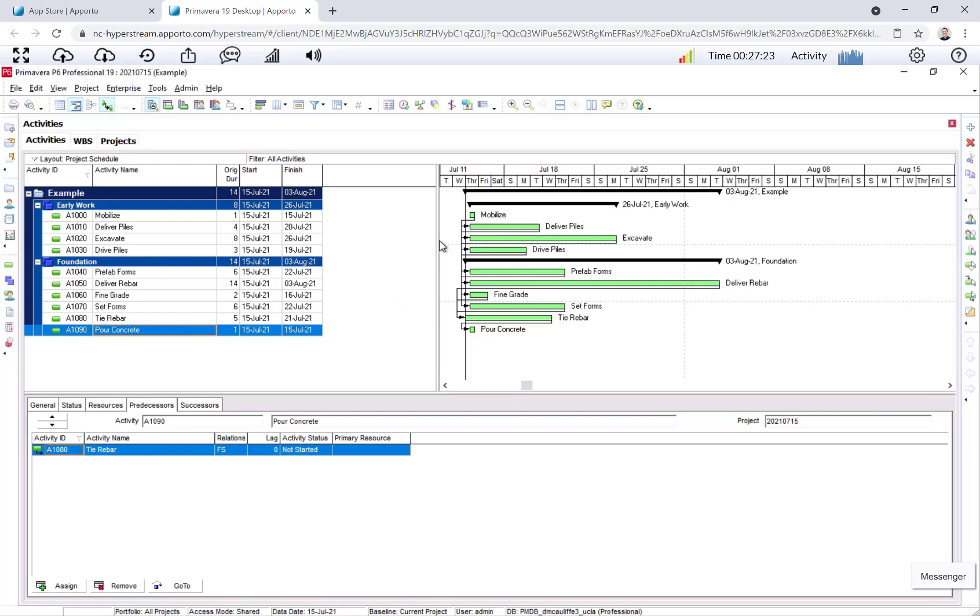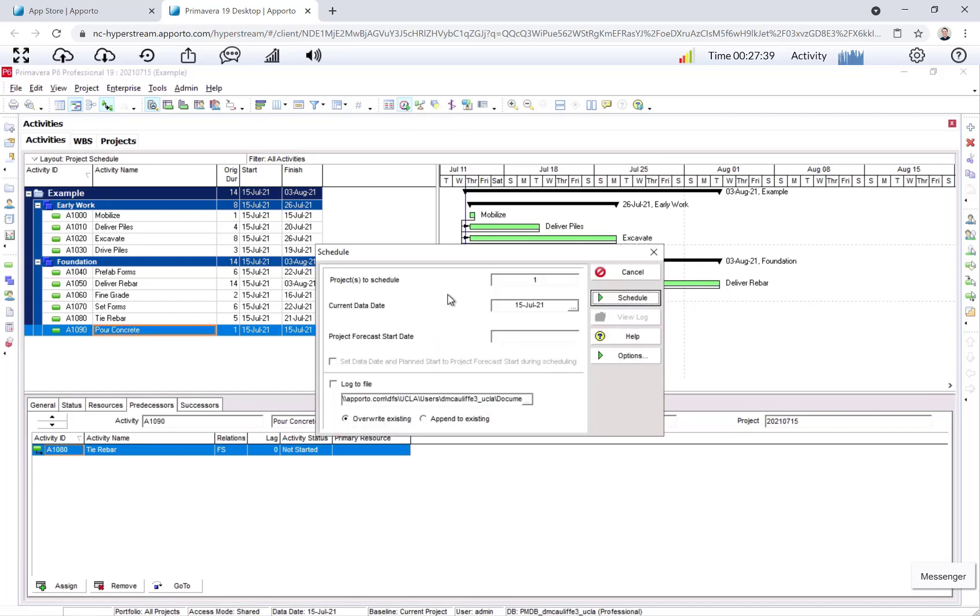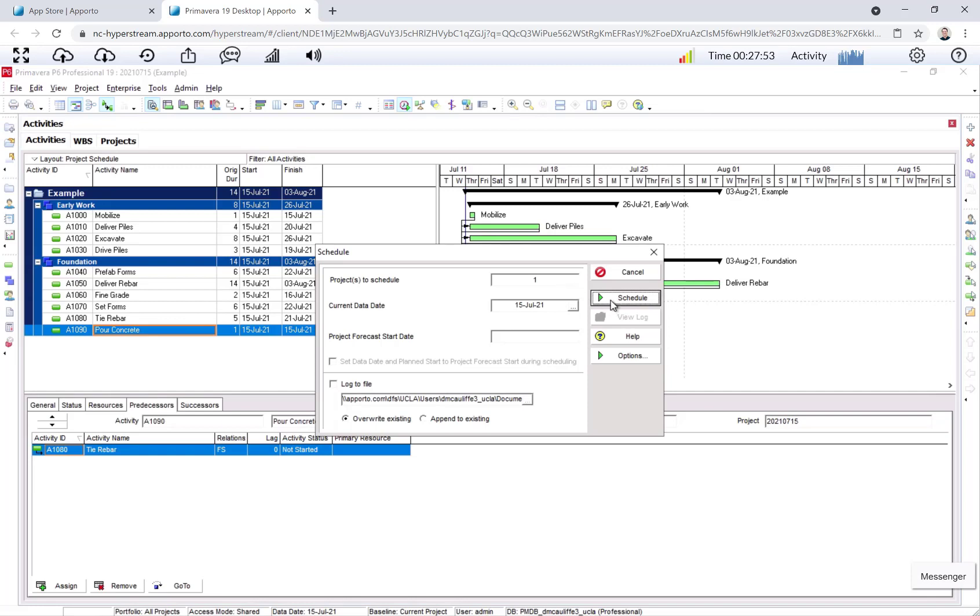It's important to know in P6 that it doesn't actually schedule the project until you do the CPM analysis. That is the forward pass, the backward pass, calculate the float. So we have to click this clock right here for schedule. It tells you the data date. The data date is the date that the schedule assumes is the earliest day that work can commence. So we're going to say today, July 15th. I click schedule.